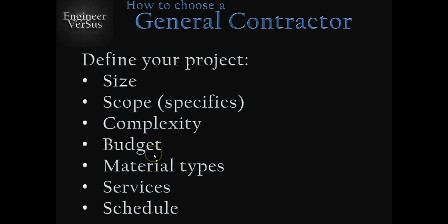And the other thing is, plan contingencies and tell them the contingencies that you're planning. If you have something where you don't know what the underground situation is, if you're doing an expansion or a renovation of some sort, and you need to do core drilling or do something else with foundation work, realize that you should expect some changes and some additional costs. Just because you tell them your budget for this project, they will stretch that budget to the maximum, and you need to have contingencies of your own in there. Tell the contractor what your contingencies are and that you don't want to go into them, because that puts you severely at risk financially, and you absolutely cannot cross certain thresholds, and you shouldn't talk about going beyond that.